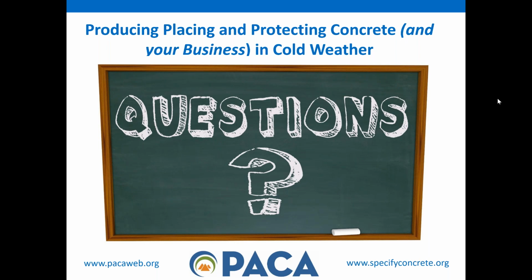Another question came in about maturity meters. What are your thoughts on maturity meters and predicting strength in cold weather? They're used very often on jobs like we saw on that one slide to determine when you can remove your forms, when it's safe to go up to the next level. You need to do a lot of correlation testing prior to using them to dial in your mix and what results you're going to get. It's an expensive way of doing things because to do it properly you need all that correlation. So it's usually confined to jobs such as we saw, where it's very important for both safety and construction efficiency that we know how much strength has been gained before we can move on to the next level. So that's where you'll see them used more often. High-rise construction, very important structures like that, it's worth putting the dollars in. Remember, you have to correlate it very well before you can use it.